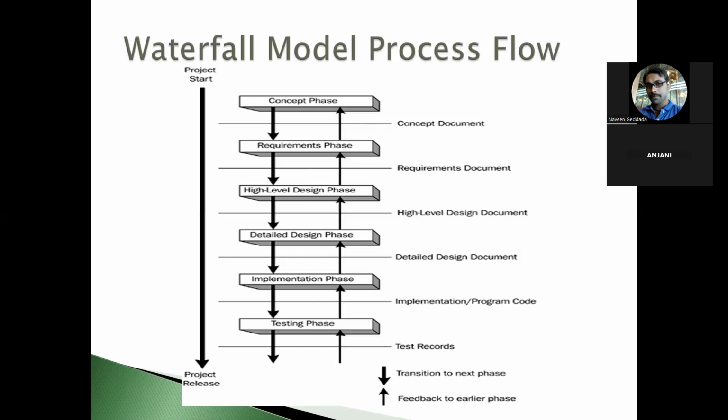Even though the requirements elicitation process, or the requirements discussion, for R1 to R5 was already done in the month of May itself, you didn't get the requirements for R6 to R10. So you are not allowed to move to the next phase, which is the high level design phase. The dev team or the resources assigned to this project need to wait until all the requirements are mentioned clearly. Then only will we move to the next phase.